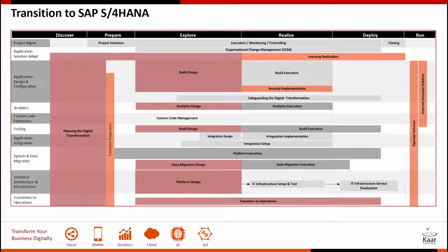During the deploy or the prepare to go live phase, we finalize the readiness of the S/4HANA and the business process for production go live, final testing, rehearsing the cutover during multiple mock runs, and finalizing the IT infrastructure operations. Also, the conversion of the production instance, the knowledge transfer and handoff between the project team and the support team.